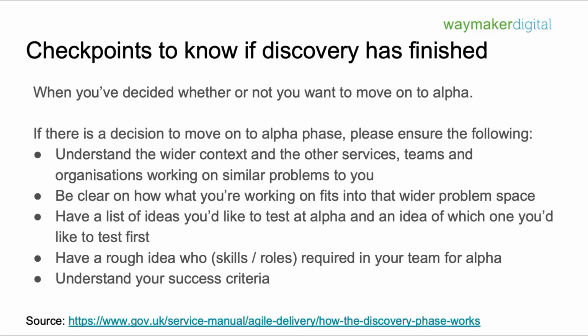Your discovery has finished when you've decided whether or not you want to move onto alpha. If the decision is to move to alpha, then you want to ensure that you understand the wider context and other services and teams and organizations working on similar problems to you. You need to be very clear on how what you are working on fits into that wider problem space I mentioned earlier, and maybe have a list of ideas that you want to test at alpha, or an idea of which one you'd like to test first.